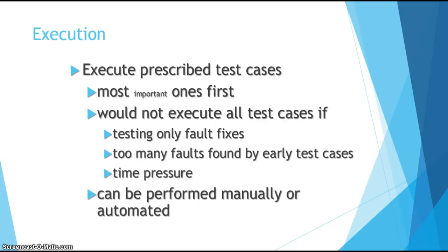Apart from that, another reason why you will not execute all test cases is you may have too many faults which were found by earlier test cases, so they are showstoppers. For example, in an email application, you're having an issue with the login part, or an issue with loading your inbox. So these are all showstoppers. Then you will not be executing test cases and it will go back to the development team.